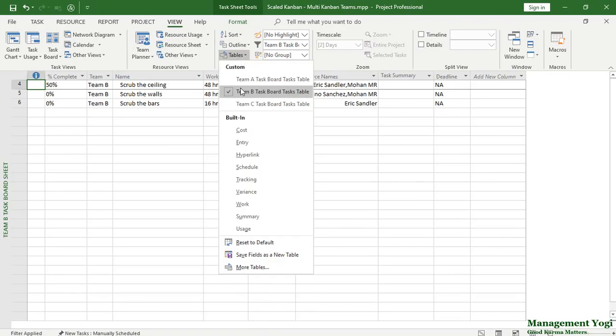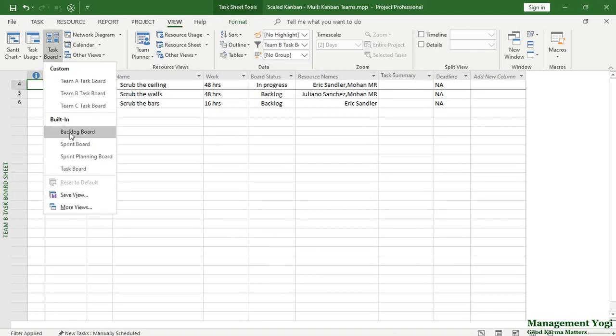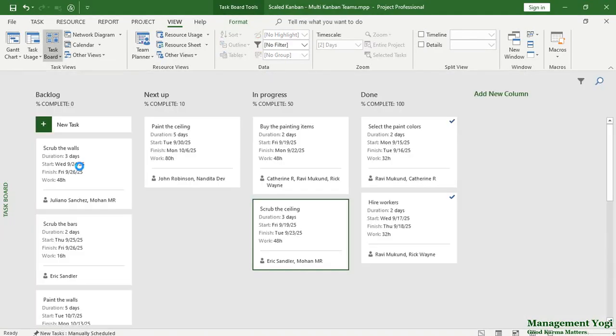Another question that will be coming to your mind: how about all the work items across all the teams? And this has to be seen by someone higher up in the hierarchy, because in scaled agile approaches the roles also have to be scaled. This I explained in my first video. So roles such as, you might have a role the chief product owner or the chief service request manager. There can be a principal flow master, because who will be coordinating or working with multiple flow master. So for those people, a consolidated view is going to be useful. For that we can use the task board view here or the backlog board view. Either of them is fine. Kanban can use both backlog board view or the task board view. I am going to use the task board view, which is the default view and easier to access.